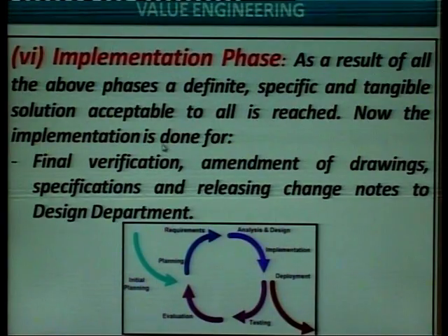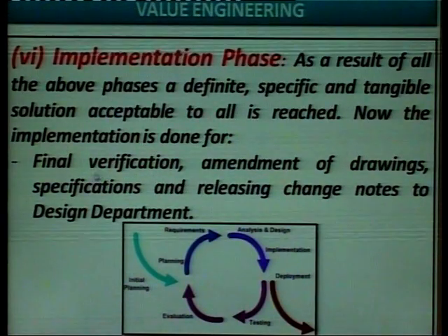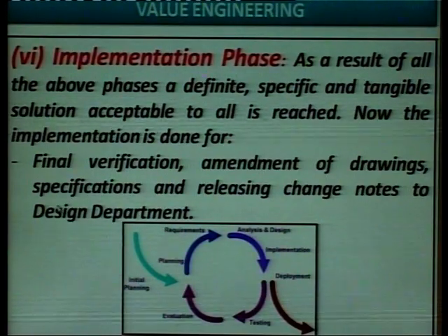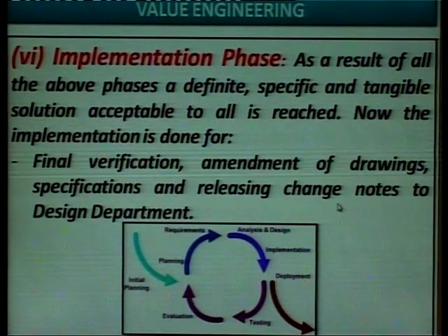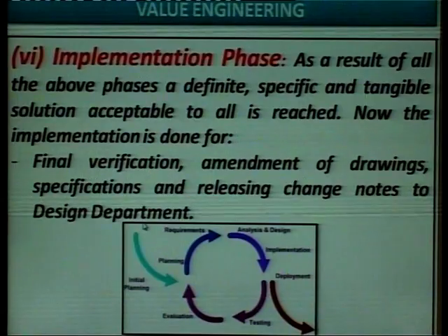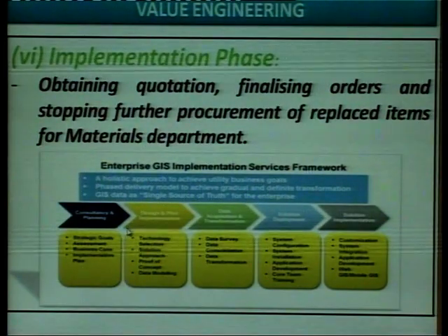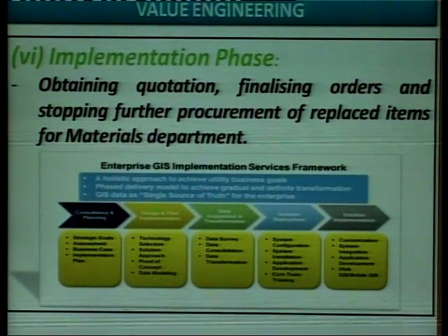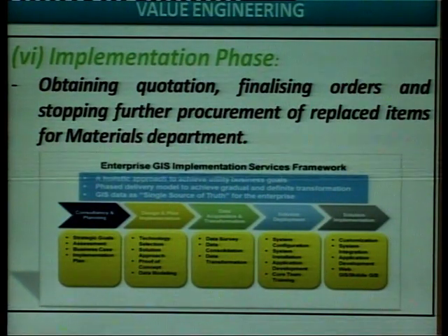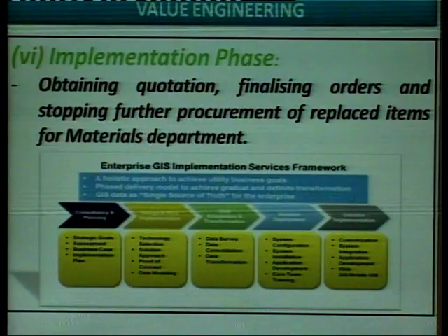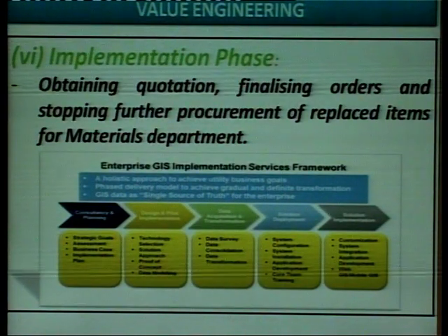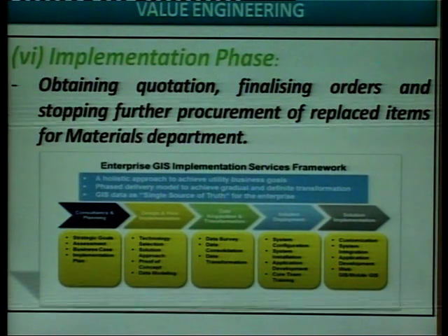Now, the implementation is done for final verification, amendment of drawings, specification and releasing change note to design department, obtaining quotation, finalizing orders and stopping further procurement of replaced items for material department.